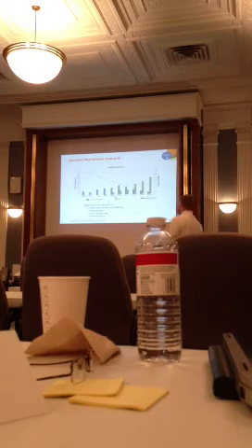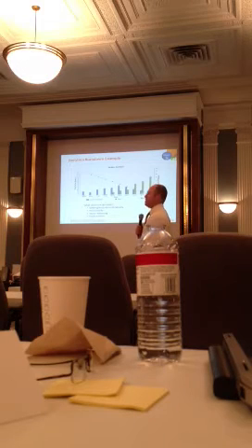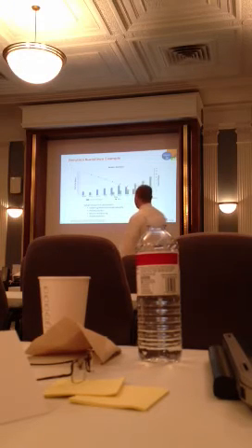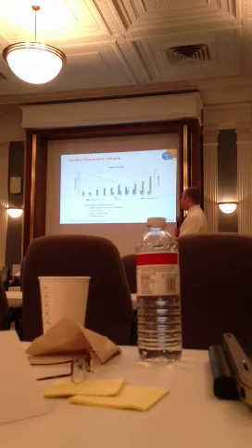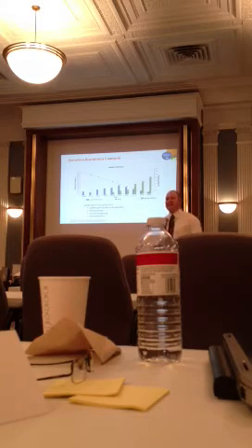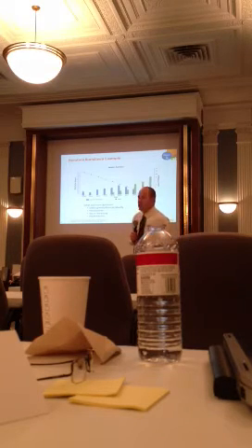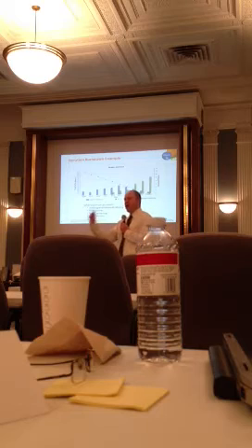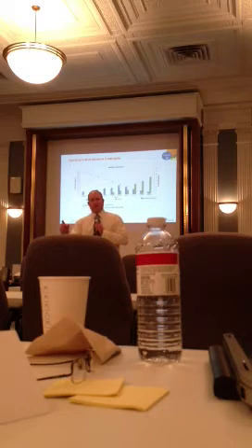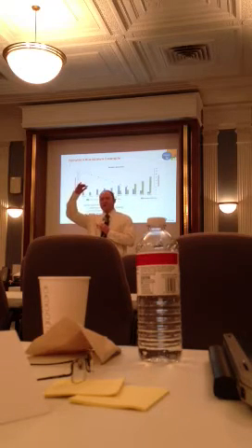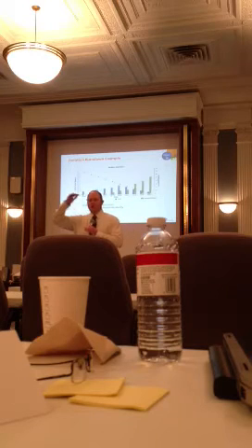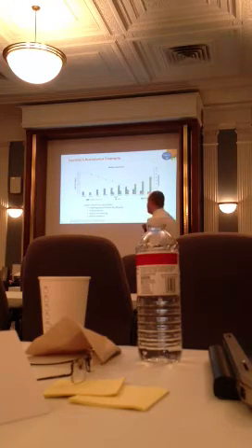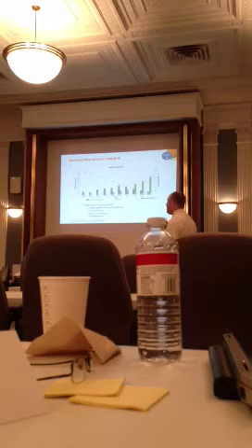All right, this is a real iteration burnout chart, okay? So, let me explain it. On this y-axis, we have the number of task hours left to do. When you create a user story, individuals create tasks for that user story, and they estimate how many hours it's going to take them to do that task. The total summation of all of those task hours for that iteration of all the individuals on the Scrum team left to do is this blue line.